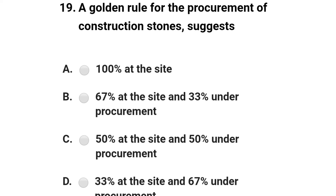Next question: a golden rule for the procurement of construction stones suggests — option A: 100% at the site; option B: 67% at the site and 33% under procurement; option C: 50% at the site and 50% under procurement. The correct answer is option B: 67% at the site and 33% under procurement.